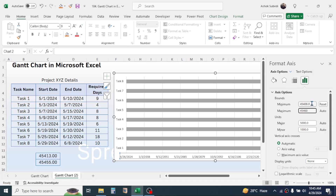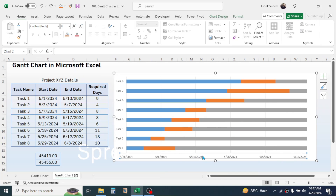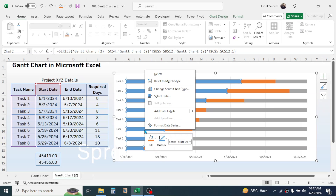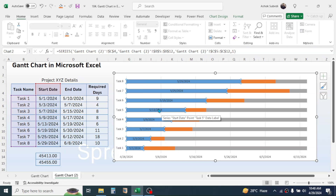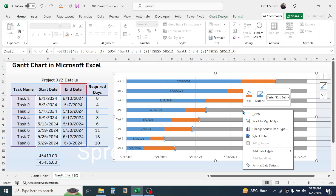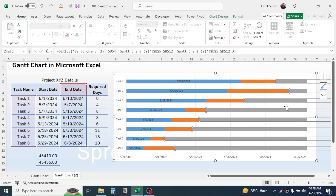Click on the minimum again so that it will reflect, then close the Format Axis panel. To display the starting date and ending date for every single task, click on the start date series, right-click, and click Add Data Label. Similarly, for the end date series, click on it, right-click, and click Add Data Labels. This will add the dates.